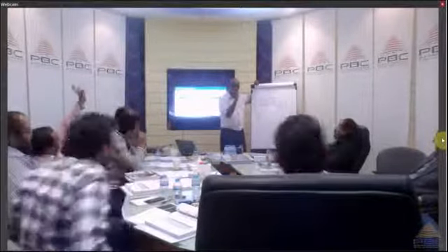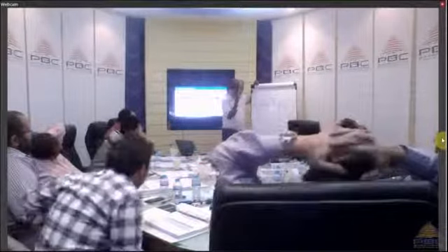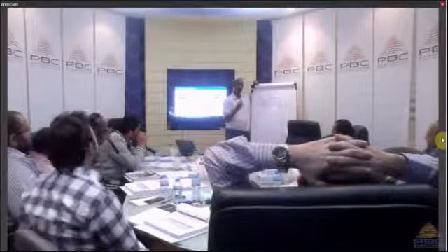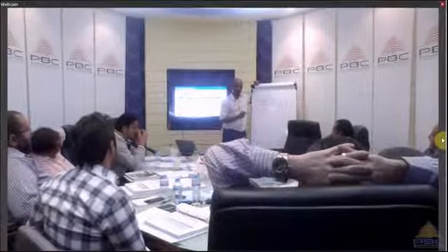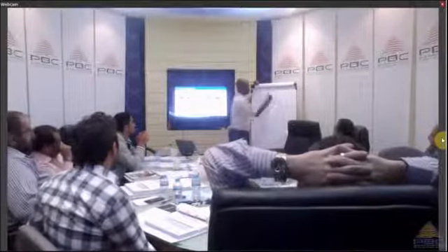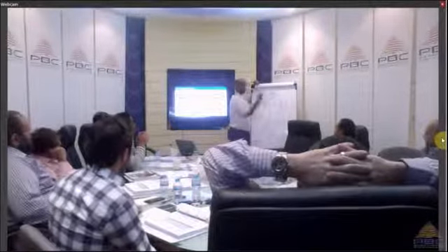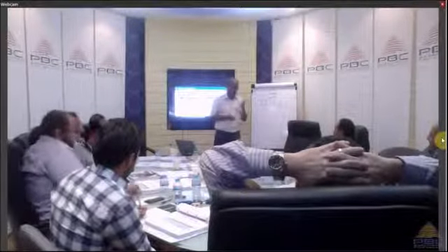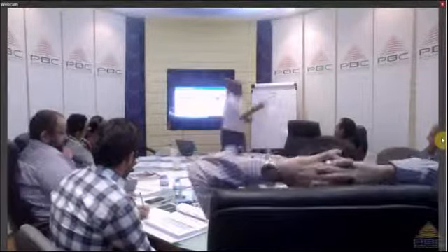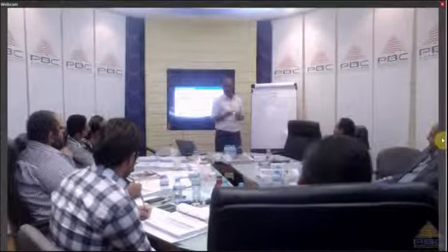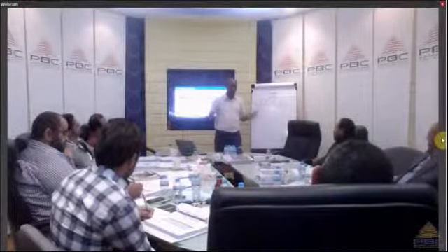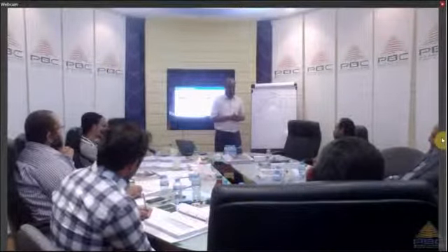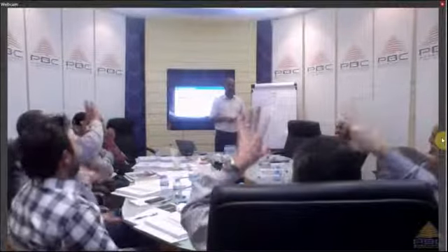I'm talking about the waiting period in between, for curing, for drying, for these things. What's the term we use for that period? Lag. Yes, lag. So that's called a lag period. Now, this lag period is a mandatory wait. You have to wait. If the lag is 1 day, I have to wait for the curing. But now I think there are technologies for the curing that can happen in hours.